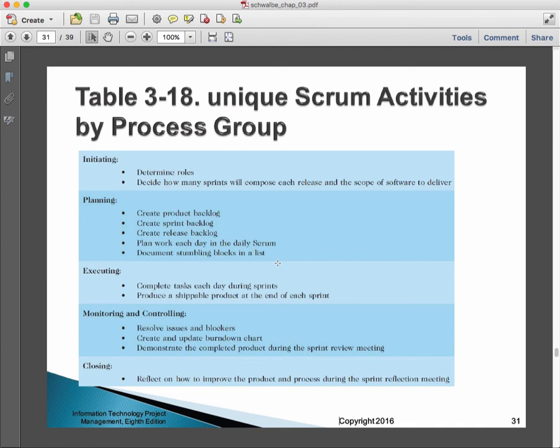We don't typically think that we're going to ship and use it at the end of every sprint, but we have this thing called a release schedule where groups of sprints can be batched up, and then we actually intend to release the software at the end of maybe the third sprint, the seventh sprint, and the 15th sprint. That's what we mean by releases.